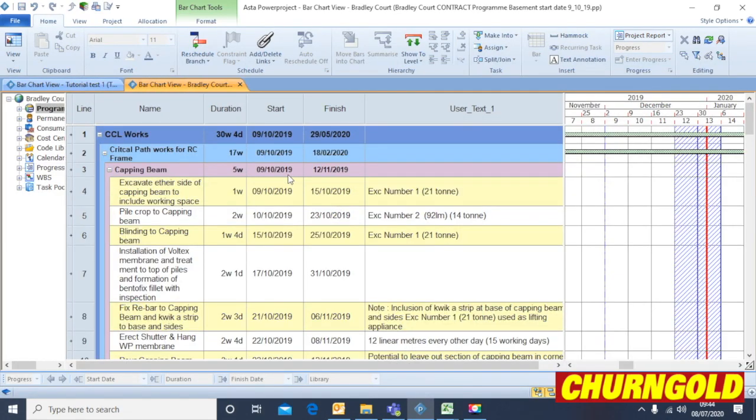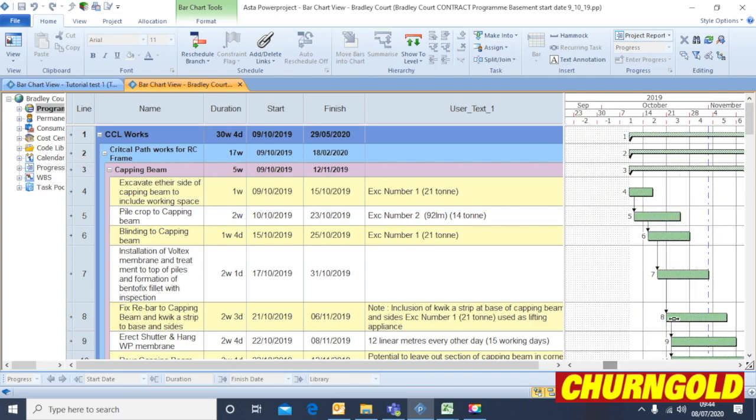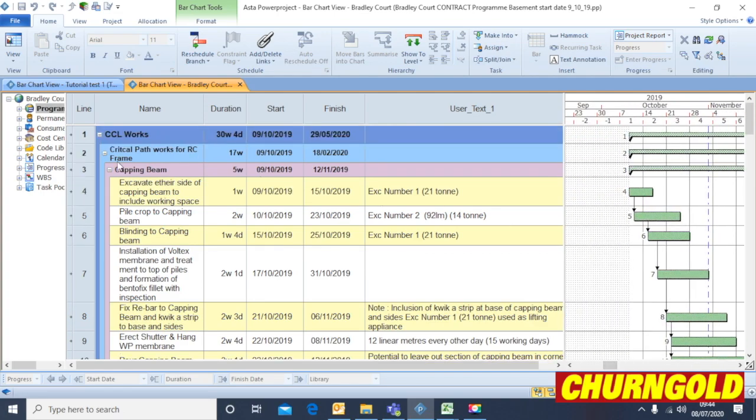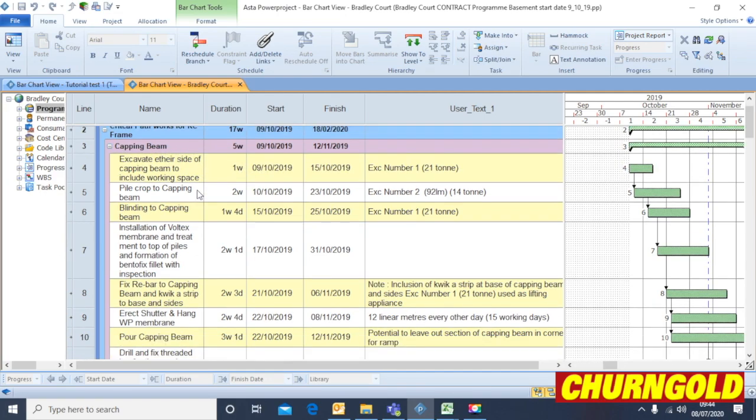You can see a complete program all linked together. So this is sort of a job in the city center, which is compromising a capping beam. So these are the capping beam works. Again, all linked with a little bit of overlap because some of the items are subcontractor.